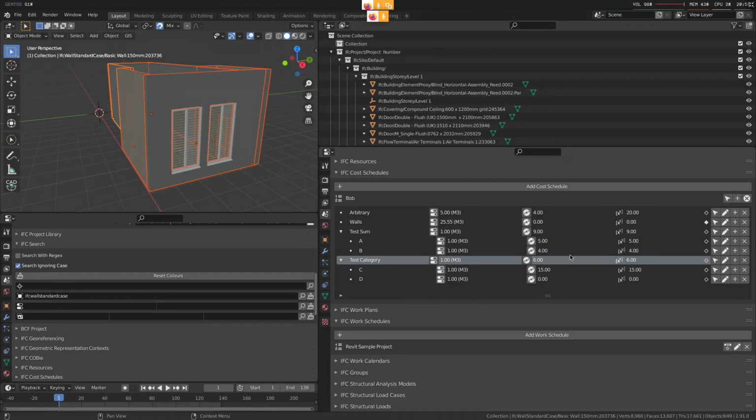I was saying if you add the first item being the formwork, the second one is concrete, and both have labor and material, and it's only the material that has tax applied to it, then you would be making it work. I'm not sure the relationships are correct for the cost value components.